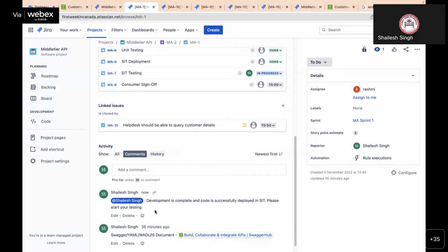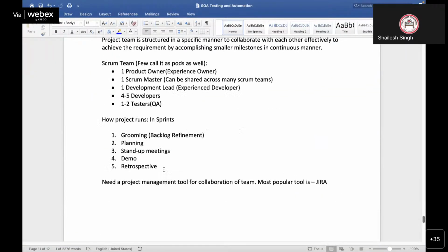So I told you that in the first 6 days, the development will happen, then the testing will happen. But what about the status, whether we are on the right track or not? For that, you will have a daily stand-up call. I told you this, right? Usually teams have it as the first meeting at 9 a.m., mostly. Some teams may have it by the end of the day also, but mostly, standard-wise, it will be the first meeting in the day.